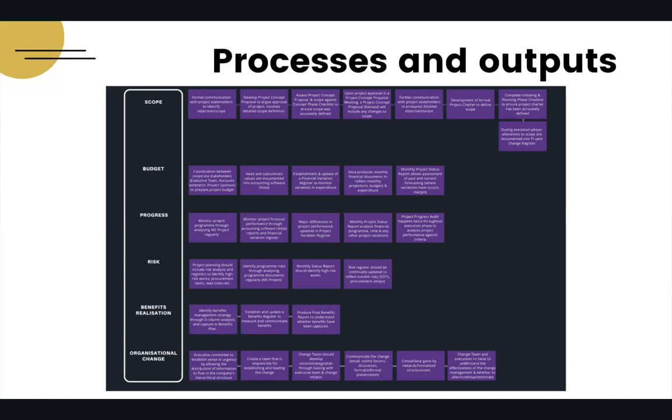So once you've done that, once you've talked and identified the scope, then you can move on to producing a project concept proposal. And then after that, you move on to your checklist and making sure that you take bits and pieces of your proposal and make them into a checklist to make sure that you've done them. And this is what this screen is talking about, giving you a step-by-step of what needs to happen for each of these attributes.